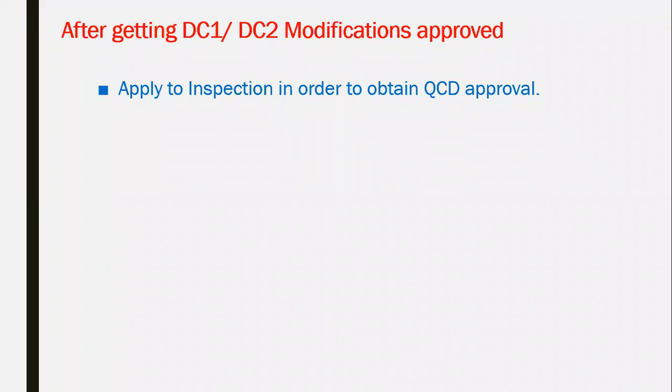All the materials have to be submitted as material submittal with the catalogs indicating all the selected part numbers, equipment, and devices. Not only this, for each device you have to submit a copy of the QCDD certificate as well, and attach it to your submittal.